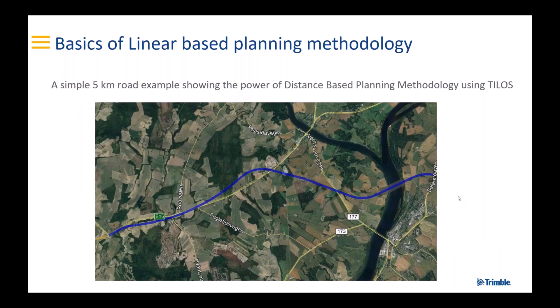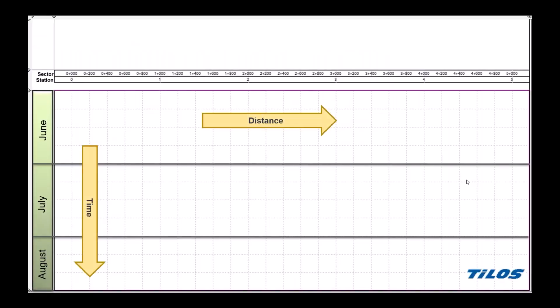For the last part of the webinar, we'll look at the simplest project ever — a five-kilometer road, which you can see here as the blue alignment on a Google Earth picture. The first thing we do in Tilos is define the time-distance space: time across June, July, August, and distance in kilometers — one kilometer, two kilometers, three kilometers, and so forth.